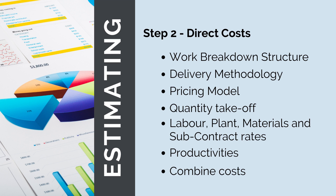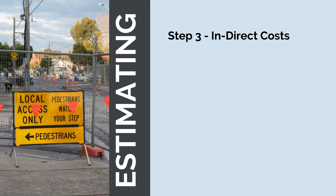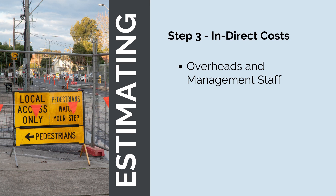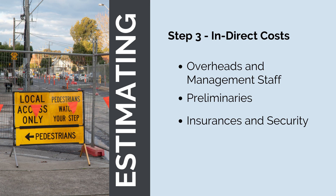Once we've worked out our direct costs, or in parallel with working them out, we can estimate our indirect costs. Indirect costs will vary from project to project, but there are three broad groups to price. First, overheads and management staff — the salaries and compensation of all project managers, engineers, supervisors and support staff who will help deliver the project. Second, preliminaries — a broad category covering all other site running costs like site sheds, cleaners, security guards and site labour. Third, any insurances and security required, and any escalation or finance costs associated with delays in payment or increases in prices.